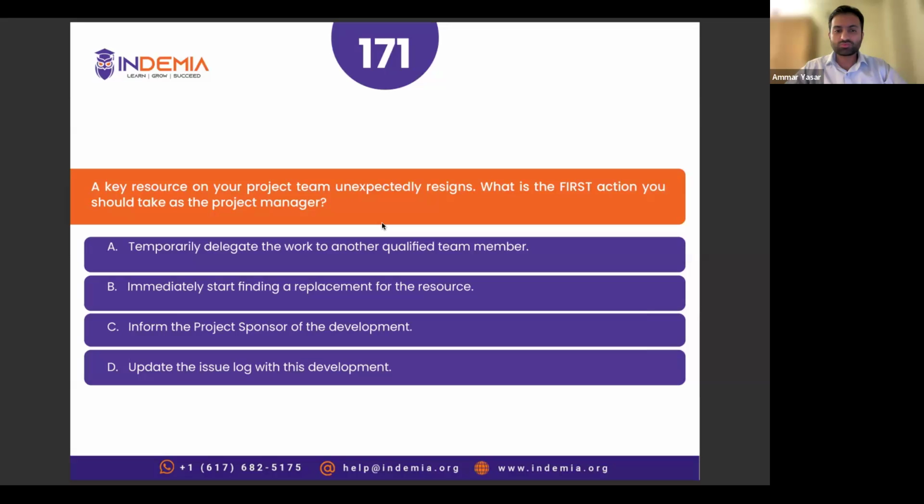So yesterday I sent you some 25 tips if you have read those. So when you're solving PMI exams, there are some PMI principles or practices that you need to understand. We call it PMIism. So one of the PMI good practices is whenever you encounter an issue, a problem, the very first thing is document that issue or problem in the issue log. The first thing is documentation. Once you document, then you find the workaround. Then maybe informing the sponsor would be the next step after that, or maybe temporarily delegating work to another team member, and then immediately starting or finding a replacement.